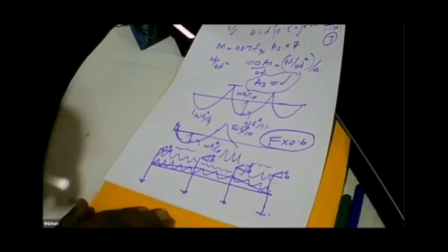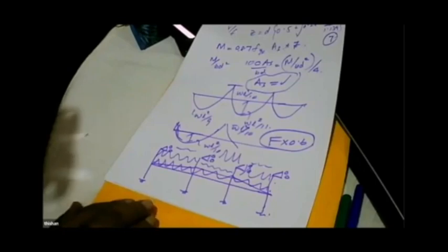Sorry, I got that wrong. Say the whole project is 5,000 million. The structural cost is 2,000 million, and the structural engineer is going to charge 2% of that. That is 40 million, right? So the structural engineer is going to charge 40 million, right?